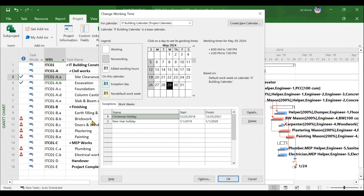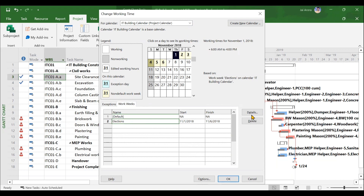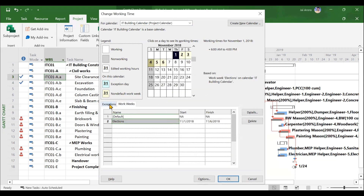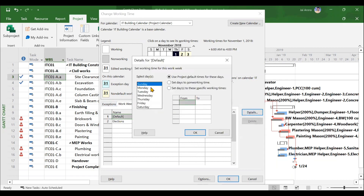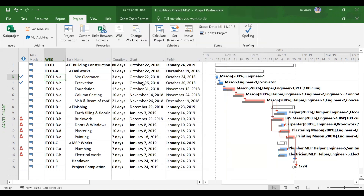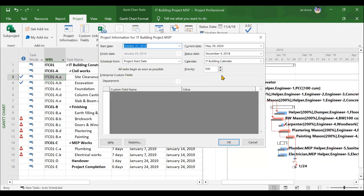For your particular project, you should define a customized calendar based on requirements. In the project's Change Working Time option, we have created our own calendar called the IT Building Calendar. We will be creating this calendar — adding exceptions like public holidays, adjusting work weeks for events like elections, and changing timings. For example, on election days, timings are 6 a.m. to 4 p.m. Normally, the site runs 8 a.m. to 1 p.m., then 2 p.m. to 7 p.m., with 1 p.m. to 2 p.m. as a lunch break. After creating the calendar, we will assign it to the project through the project information tab.